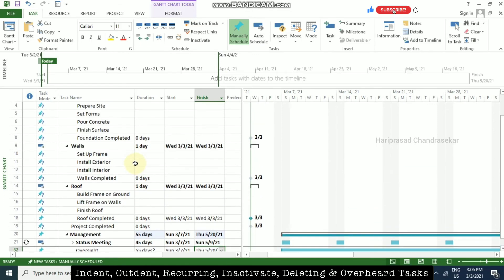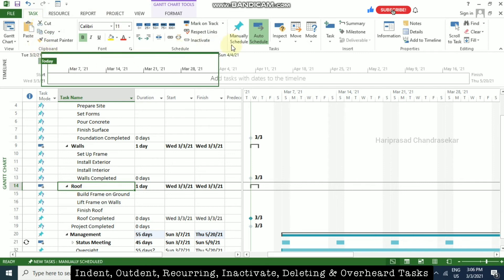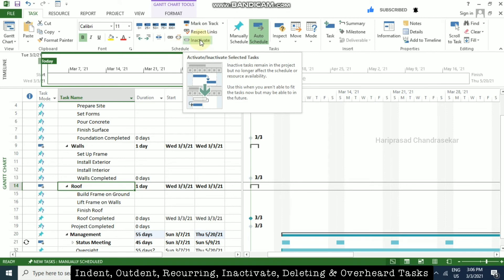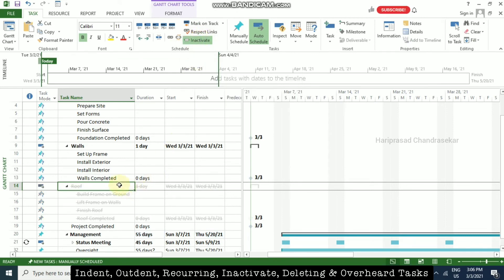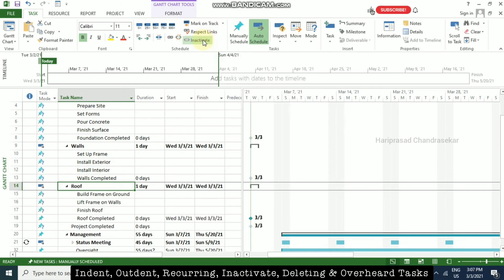Now I will explain what an inactive task means. We can put some tasks in our project as inactive. For example, I am going to select the roof tasks, go to the Task ribbon, and in the Schedule options we have an Inactive button. Click this to make them inactive. Everything will become inactive but the project workflow will still be visible, showing those tasks as inactive.